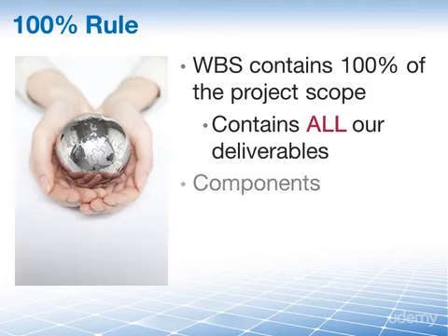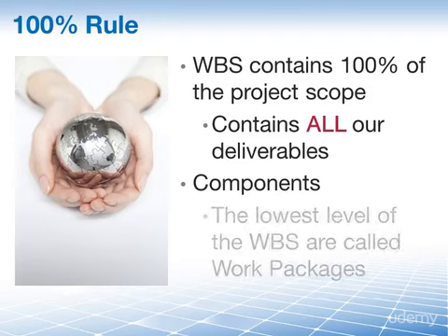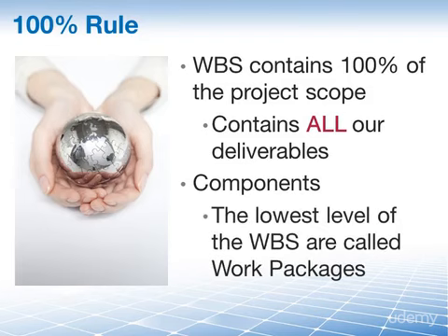And second, the components at the lowest level of the WBS are called work packages. Work packages can be scheduled, the cost can be estimated, and they can be monitored and controlled. In other words, these work packages are deliverables that we can assign to a team member.